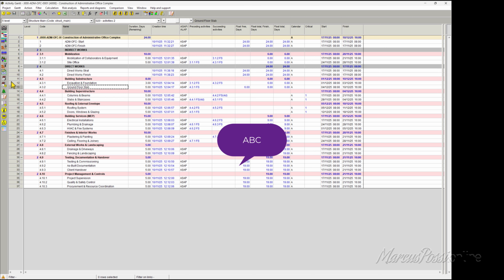You have to have your calendar, you have to define your work week. And not only having your weeks, you have to set your holidays and your exceptions. Instead of calling them holidays, people here call them exceptions.